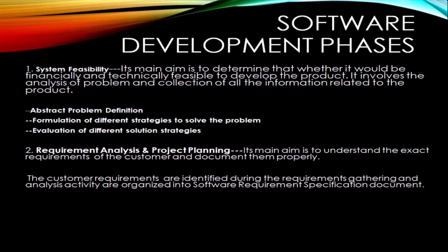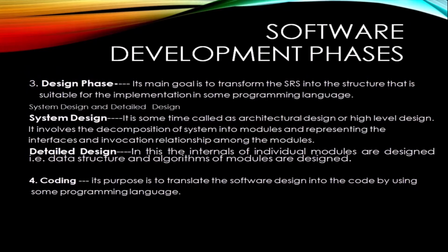The client usually does not understand how the software is developed, and the developer usually does not understand the problem domain of the client. This causes a communication gap, and during requirement analysis, this gap is minimized through interaction or meetings between the two parties. The customer requirements identified during the requirements gathering and analysis activity are organized into a software requirement specification document, or simply SRS.